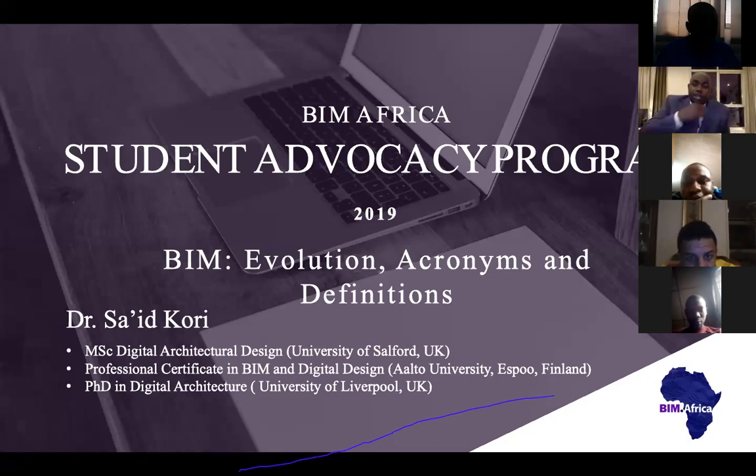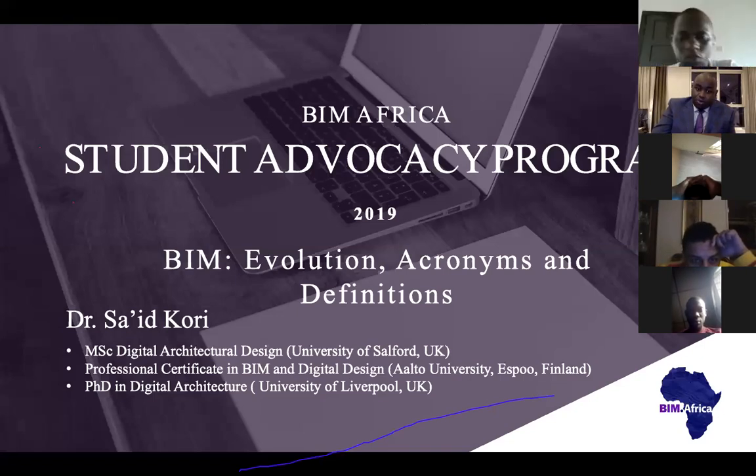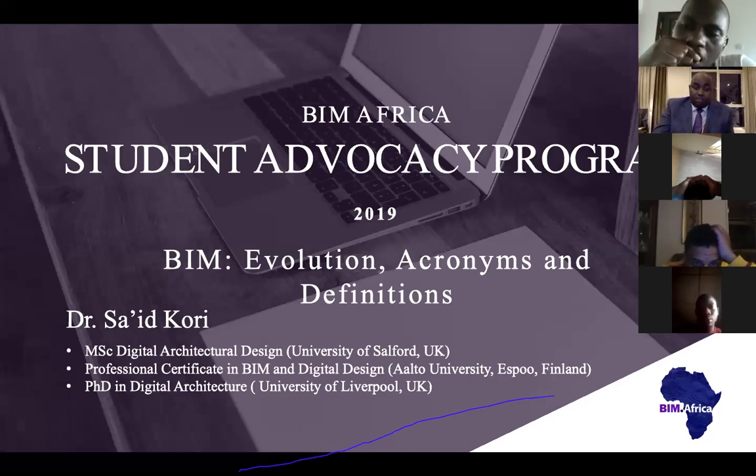Okay, well, you see, that's exactly what the BIM standards set. Because of those issues of data sharing, for example, I'm just going to give you some reference to the project we do. One, the architect should never give an editable model to any other stakeholders. The architect should only give the model at the IFC level. You get it? Which is interoperable for all the structural and other stakeholders for them to understand. But you cannot edit the data of the architect. And someone can also not edit the data of any of the professionals.